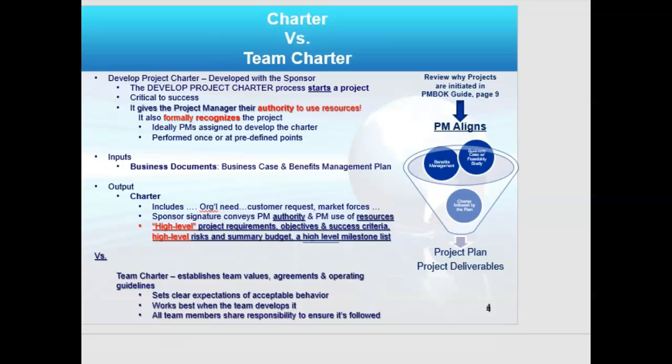So you notice on the right-hand side, you are aligning the business case and the benefits management plan, and you're narrowing it down to a formal document called the project charter. And you'll use that charter next to develop the project plan and produce deliverables.